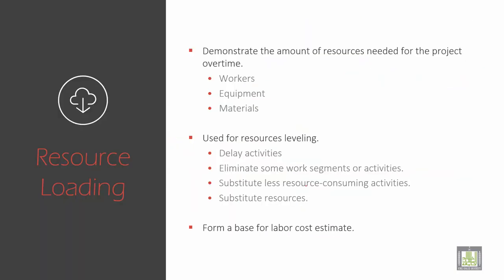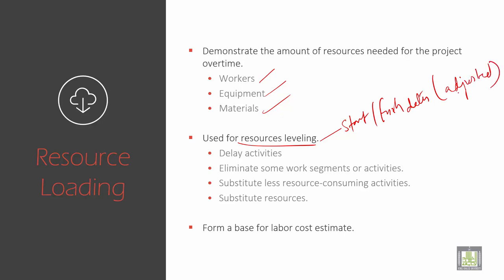Then how do you demonstrate the amount of resources needed for the project over time? Like workers, equipment, materials. Then you have what is known as resource leveling. What is resource leveling? It's a technique in which start and finish dates are adjusted. That's very, very important. They are adjusted based on the resource limitation.